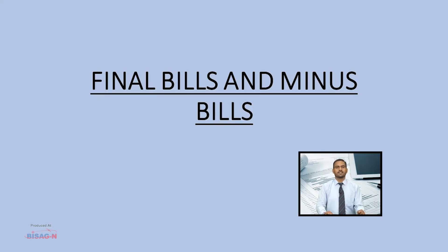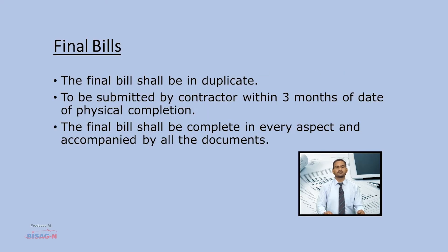The final bill shall be submitted by the contractor on IAFW 2262 form in duplicate within three months of physical completion of the work to the satisfaction of the engineer in charge. The engineer in charge shall ensure that before forwarding to GE, the final bill shall be complete in every aspect and accompanied by all the documents — for example, statement of store, TNP water recovery provided to contractor, and statement of all charges.